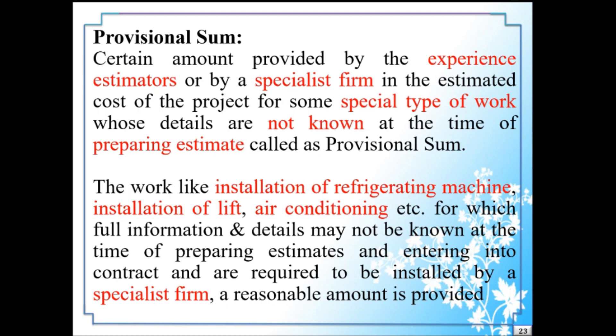Next one: Provisional Sum. A certain amount provided by experienced estimators or by a specialist firm in the estimated cost of the project for some special type of work whose details are not known at the time of preparing the estimate is called a provisional sum. If there is some special type of work in the project whose details are not known at the time of estimating, then for that work, experienced estimators or a specialist firm provide a certain amount, and that certain amount is called a provisional sum.